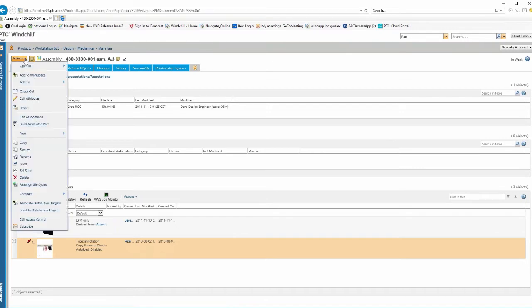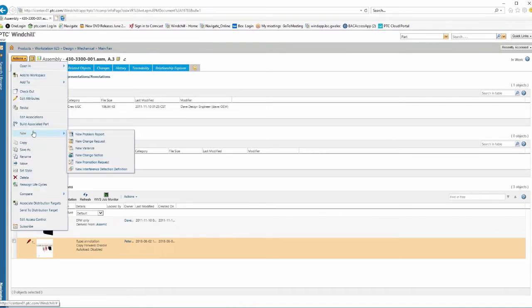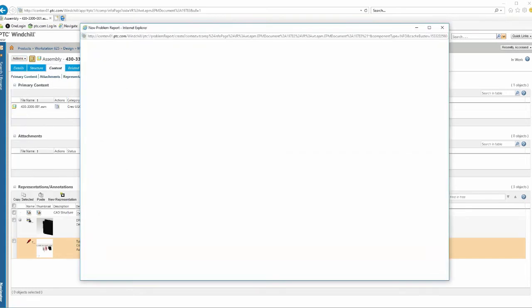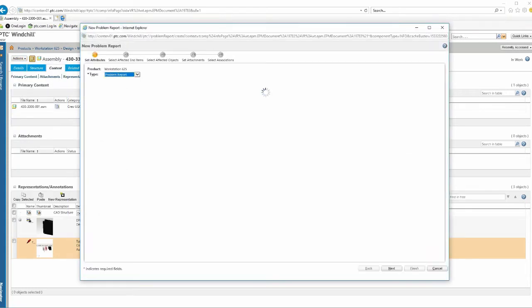So I'm going to come over here and say, I want to create a new problem report. And remember, we create a problem report and then a change request and change notice. So this is kind of our first step in our out of the box scenario. We'll create our new problem report.